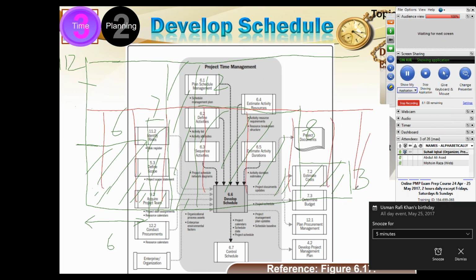If that be the case, and I can hire only 8 people constantly for the whole project, and somehow I arrange it in a way that I will never use 12 people, even if those activities which require to be done simultaneously using 12 people, I somehow effect them to enlarge their duration, thus affecting even the critical path.